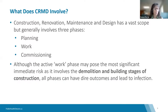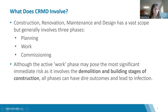CRMD has a vast scope but generally involves three phases: planning, work, and commissioning. It is not just about major undertakings like constructing a new facility or adding a wing — it involves all levels of work, including things considered mundane, like reconfiguring or painting a room, or installing a portable air conditioning unit. All projects can pose a risk, and simple work can quickly escalate. Although the active work phase may pose the most significant immediate risk, all phases can have dire outcomes and lead to infection.